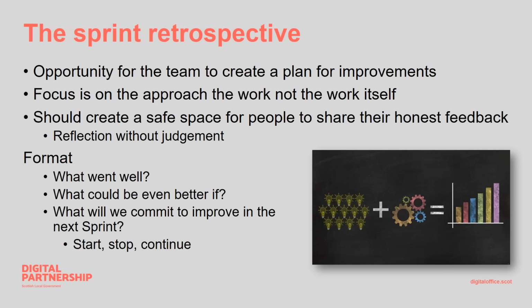Well, as a team, we discuss what went well during the sprint, what could have been even better if, and then, and this is the important part, what will we commit to improving in the next sprint? And this is the action that helps improve what you do. And this can be in your start, stop, continue format.